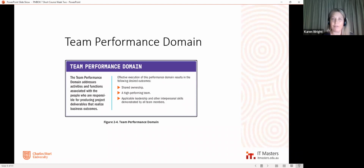Yeah, so a couple of very practical questions there. How often to meet really depends on the project and also on the stage of the project. If my team are right in amongst gathering requirements and working really hard to sort out the nuts and bolts, I'm going to be meeting fairly frequently. But if development work's going on and I only need to get the stakeholders together for a bit of user acceptance testing or whatever, then maybe less often. You've got to be really careful that you don't overwhelm the stakeholders. Sometimes they're only there for some of the time and they've got a regular day job as well. So we certainly don't want to overwhelm them with project work, because they can quite easily become unmotivated and not want to work on the project. So it can be a bit tough.